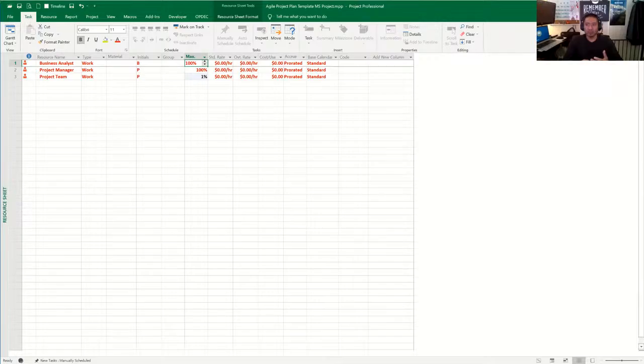That's being realistic, because in reality you're only doing 80% of the work, because at 20% you're getting settled in. You're driving to work, you're clocking in, you're getting breakfast, you're getting lunch. You're just keeping that time to get settled in and adjusting to your day-to-day grind. So 80% is feasible, I guess, but 100% is also done as well. But I try to influence 80% of max units.